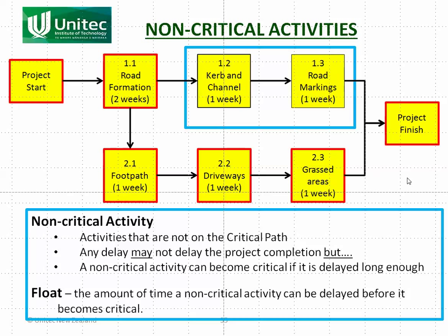Now you can see that this is quite a good way of defining the project. You want the project to finish at a specific time. You want to identify which activities are the ones that we need to stress need to be completed on time. If one of these is starting to fall behind, we need to put extra resources in to complete it on time, because we know that if we run over time, we're going to finish late.